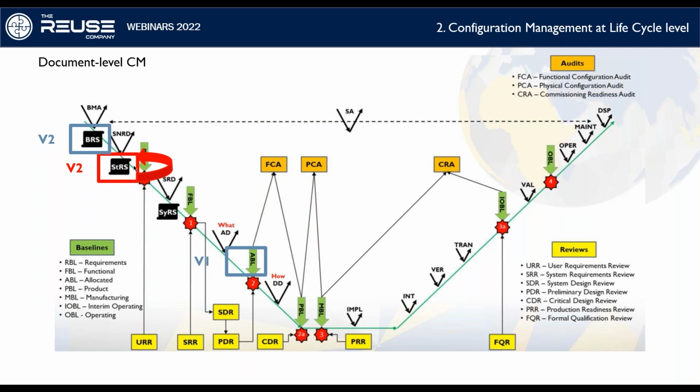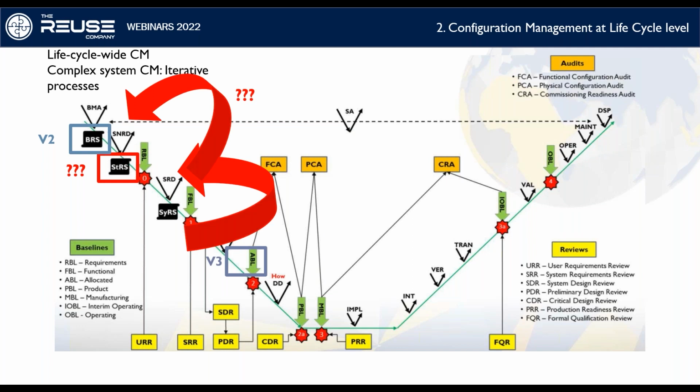We go from the definition of the requirements to the inspection, and we have the management that is supporting all the activity. But then when it comes to changing in complex systems, we have iterative processes. That means that when we change the version of the document here, version 3 might impact another specification, which might itself impact another one. If the change in this document here at the architecture definition level impacts stakeholder requirements, we might have to come back to the business specification to validate if it's still meeting the customer objectives or the user objectives, and we have a loop.